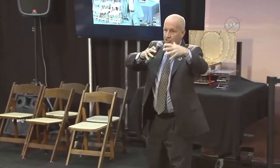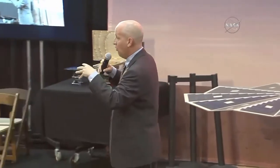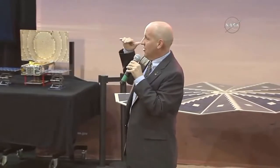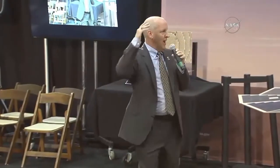We're going to move that mobile service tower that surrounds the Atlas V right now. Back that away. That's going to happen about midnight tomorrow night, first thing Saturday morning. Then we're going to put all of the cryogenic propellants, the liquid oxygen, liquid hydrogen on board. That happens about 2.5 hours prior to launch. It's when it starts. And then if all has gone well and we have a good range and good weather, we'll be set to go starting at 4:05 for T0.